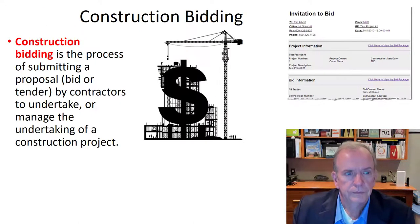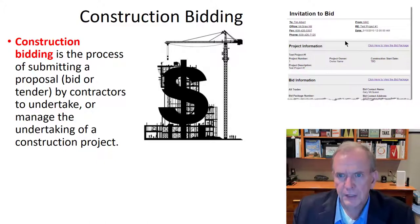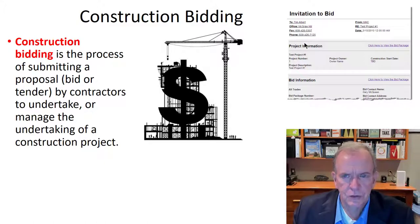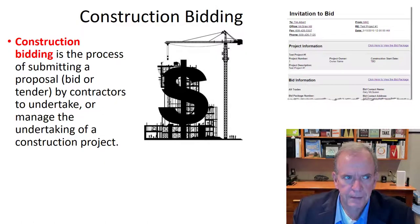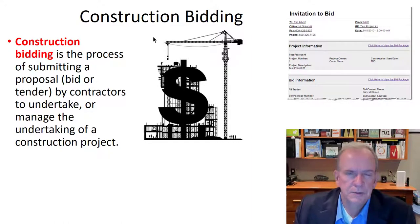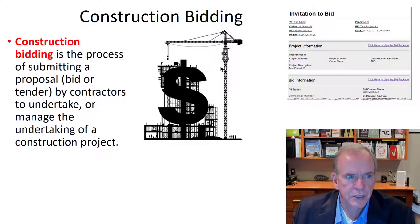In construction bidding, there's usually some sort of public invitation to bid, especially if it's a government project. There are different avenues where it's advertised, like the daily construction news, which puts out that you can bid on this project if you comply with the pre-qualification requirements. Government projects have certain processes; private projects might do it differently — they might have preferred contractors they want quotes from or put out a formal invitation to bid.